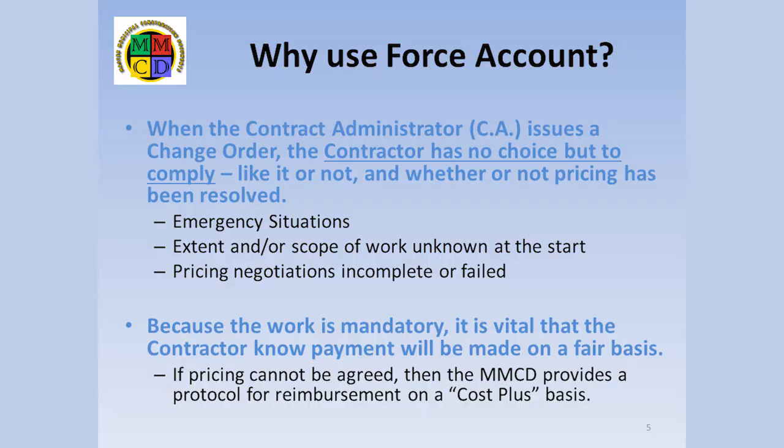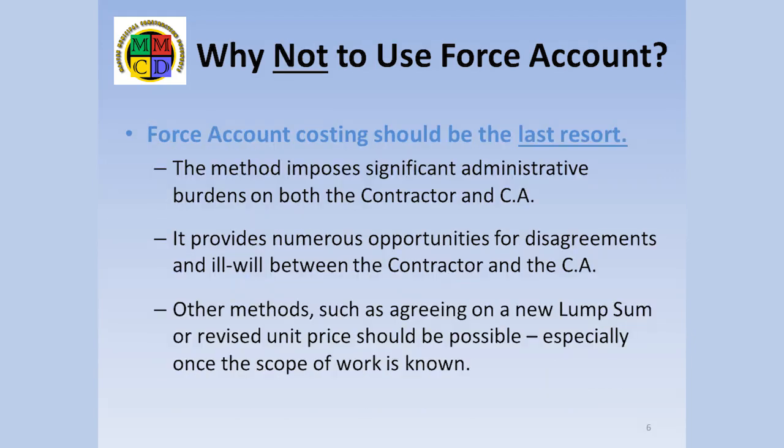The other reality is that sometimes it's just not possible to set a price in advance of the work being done. Examples are in an emergency situation, when the scope, extent, or difficulty of the additional work is uncertain at the beginning, or when negotiations are incomplete or have failed by the time the additional work must start. However, force account pricing should be the method of last resort.